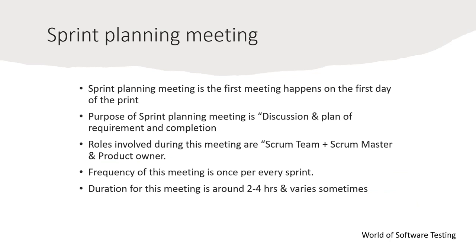Once the product backlog is ready, the sprint planning meeting happens and everybody from the scrum team is involved. The team reviews all the stories in the backlog, and some stories are picked for that particular sprint based on the scrum team's commitment. Based on those committed stories, the sprint backlog document is created.